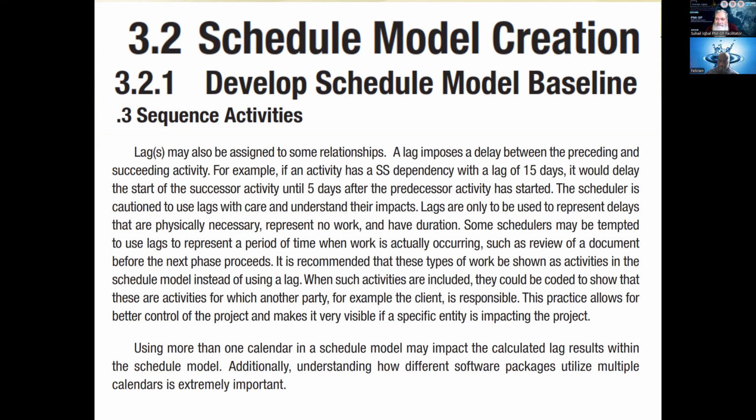And moreover, I would say there should be penalties for such activities if they delay it. Normally when you are having a contract, it usually says that we will deliver on, say, this date. Within 3 days of the submission, we should be given the approval. So actually, 3 days are reserved for the approval. If 3 days have passed and the approval has not been received, it would automatically be legally considered as approved and we will proceed ahead.